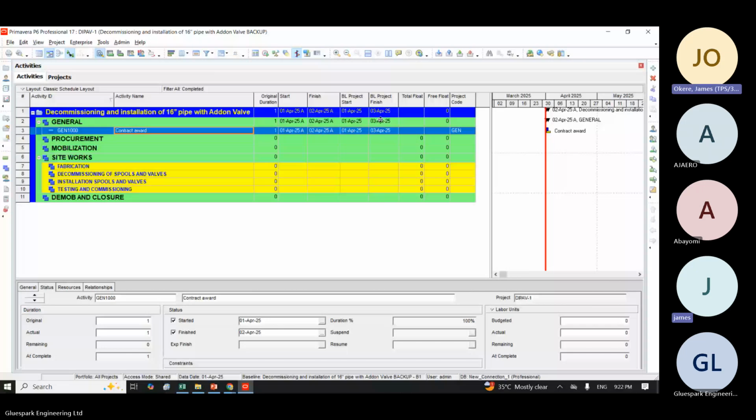So that whoever comes there, or during your standing meeting, sometimes we call it the team brief meeting, you just come to site or to the office, you stand up, and everybody looks at what we have in the plan and how we are doing, right? You see the project manager pointing at it. This activity should proceed. This one should step down. We are going to do this because of this. We don't have material, so let's proceed with this.